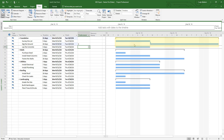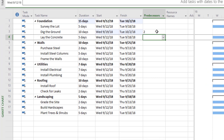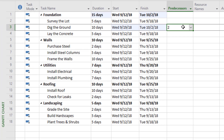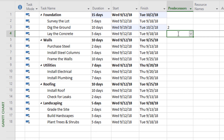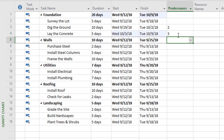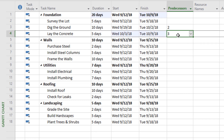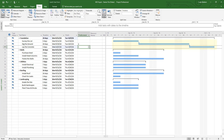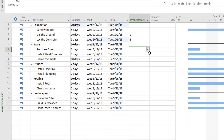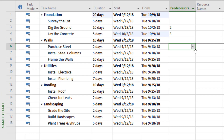For laying the concrete, we can't do that until we've dug the ground, so the predecessor is number three — digging. We dig, and then we lay the concrete. Looking at the Gantt chart, we can now see those relationships: survey the lot, dig the ground, lay the concrete. Remember, those numbers in the predecessor column correspond to the numbers on the left-hand side of the task pane.